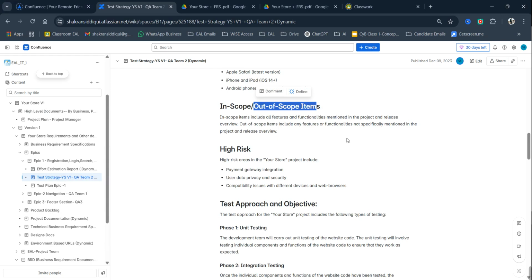I didn't have the coupon button to test it, how will I test it? I let the developers know, but it wasn't fixed and the sprint got over. So it went out of scope. Later on, there will be another sprint decided in order to fix these issues. We will know more about these things in depth.